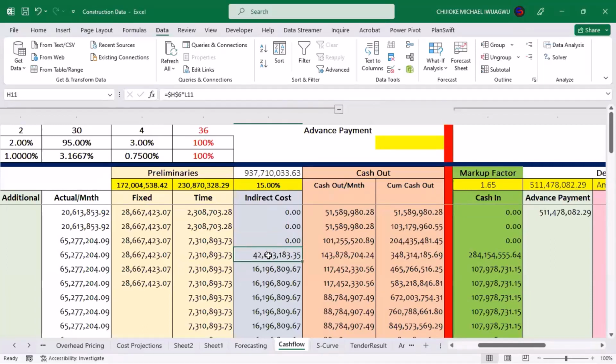Okay? Now, that is what I have to do now. What I will have to do is take a percentage of an amount that I'm expecting, which is equal to this percent, which is 15%. I've removed my profit already. And make sure that you fix it, times the amount that will be coming in each of those months where you are expecting to receive your payment. I will say enter.